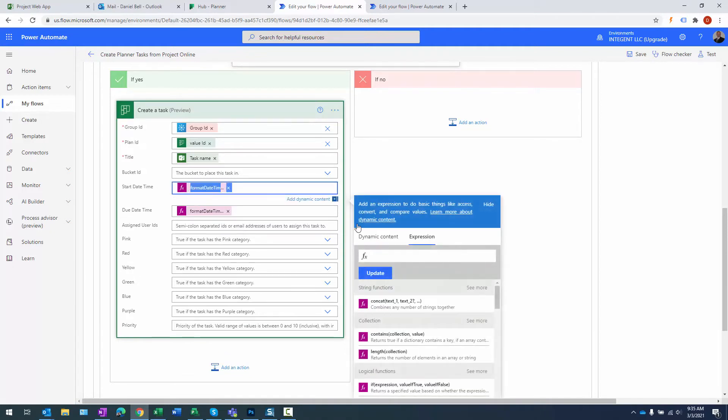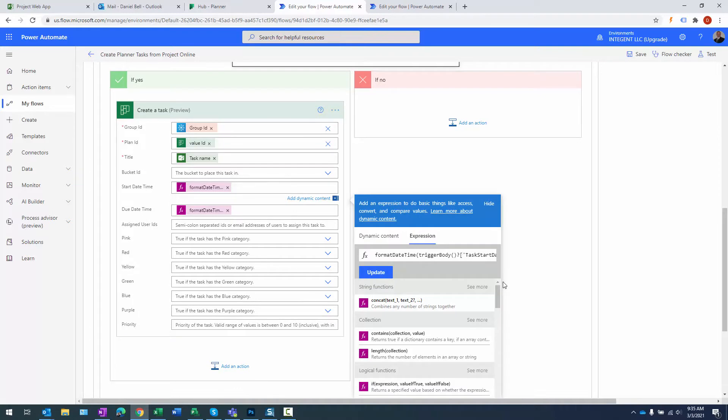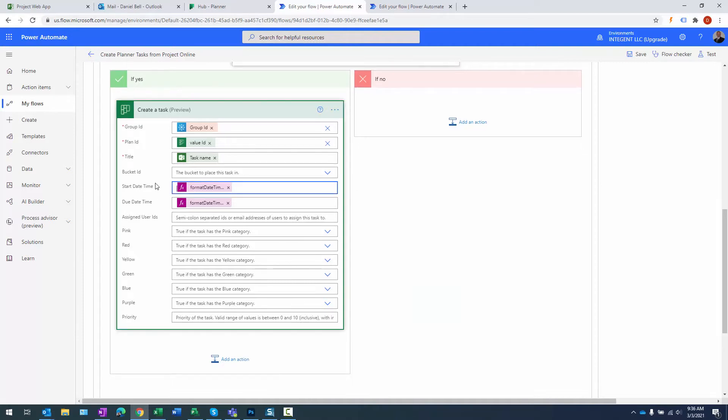We take the task name from Project Online project and use it as the title of the task in this particular planner project. Then we put the start date time and the due date time in here that come from Project Online. Basically, this is the start and finish date of the task within Project Online. There will be a blog post that provides more detail as to what these formulas look like, so if you need them, you'll be able to copy them.